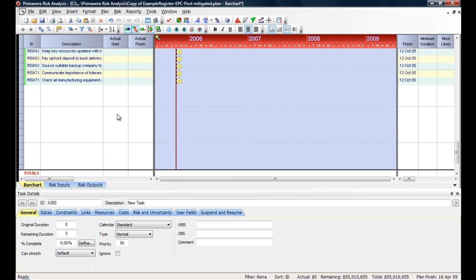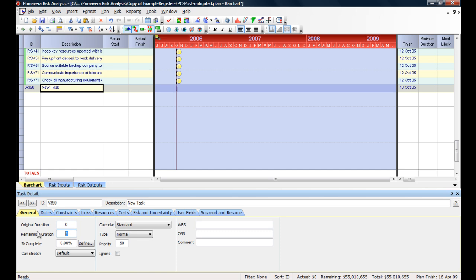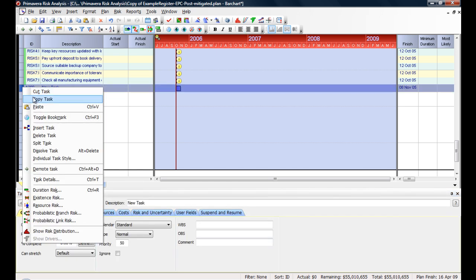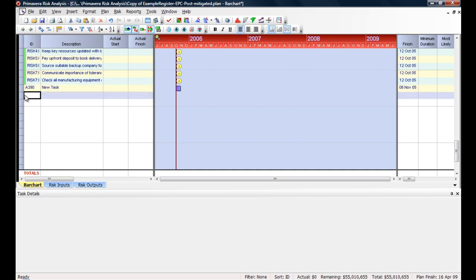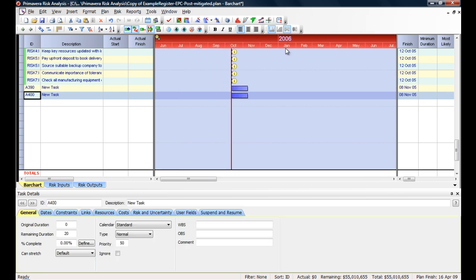The last thing I'll go into is manipulating activities directly in the Gantt chart view. I'm just going to create a new activity real quick, and we'll get a couple activities in here. Do a copy and paste. We'll add a couple new activities. Now the first thing that you can do is hover directly over the middle of an activity, and you see a double white arrow. If I drag, I can create a nudge date here. So it actually created a nudge so I can run scenarios.